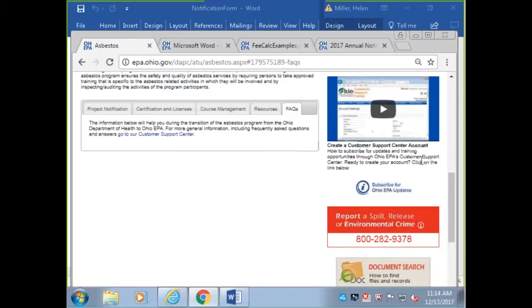Lucas County Land Bank currently submits EPA notification on a spreadsheet. Will they continue to do that, or is the contractor doing this now and responsible for accurate dates? Yeah, we're going to need to have an actual form submitted for any job that's going on for the Lucas County Land Bank, and not a spreadsheet.